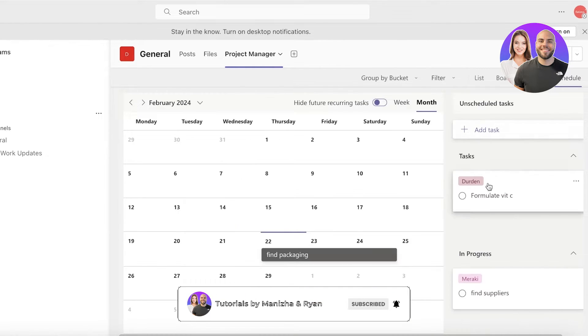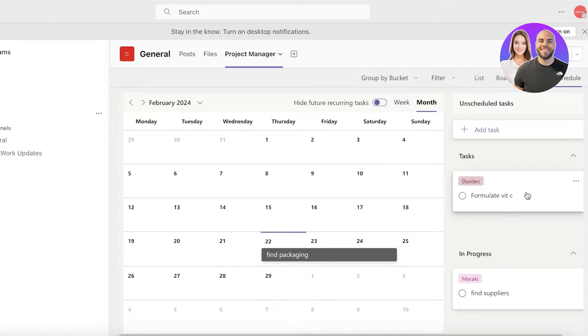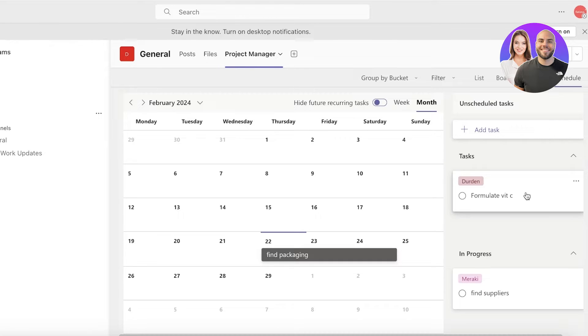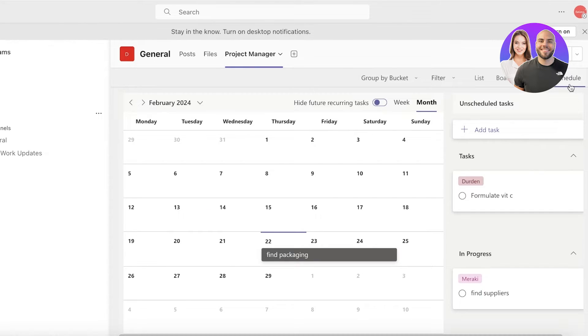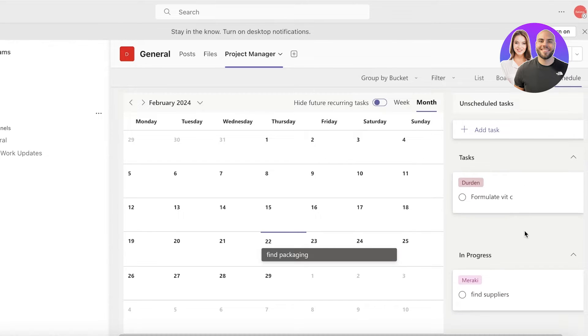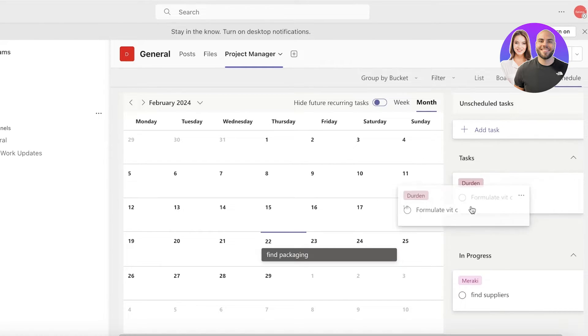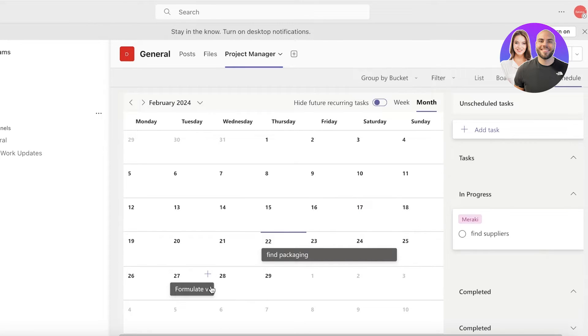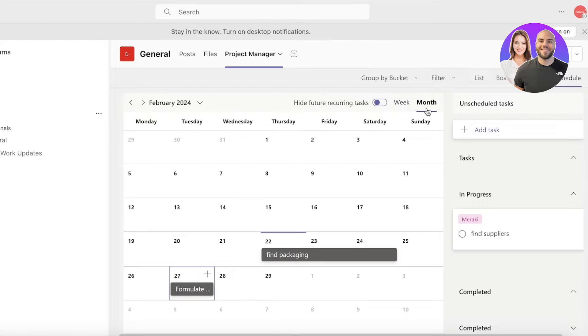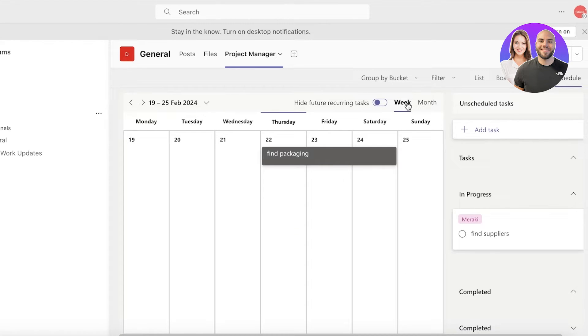If I add a due date like this and I add a start date like this, this can help us in viewing the task in the schedule section. Plus, if I want to push in more tasks into my day and I'm not certain about which days I would be free to add more tasks, I can go into the schedule section. Once you're in your schedule section, on the left you're going to find all the tasks that haven't been scheduled, so you can just drag and drop a task on a certain day to help you in scheduling your tasks.